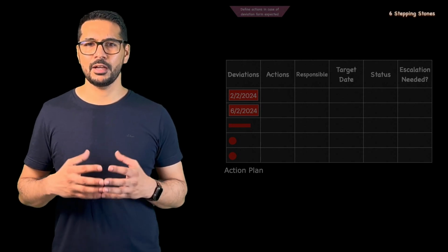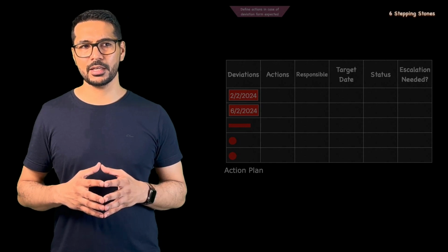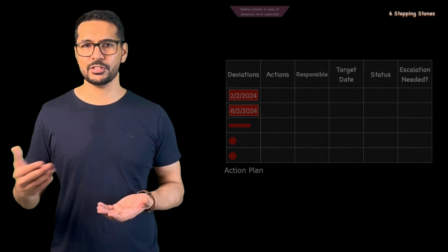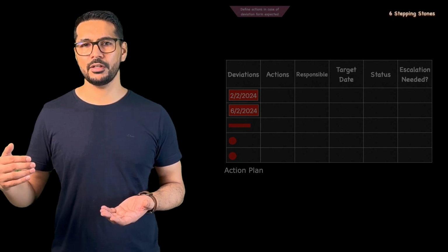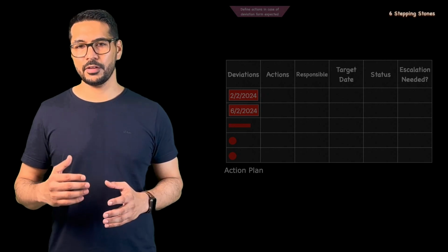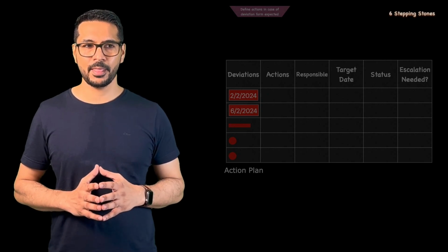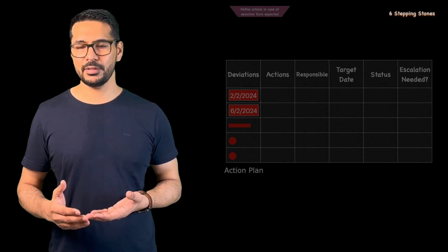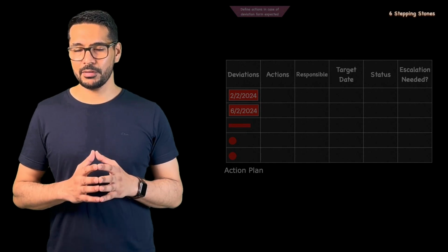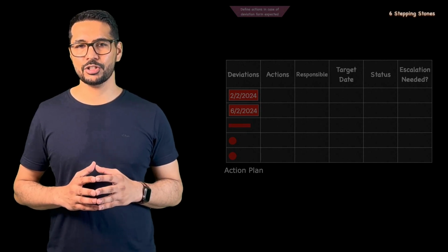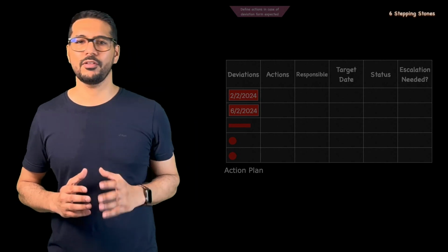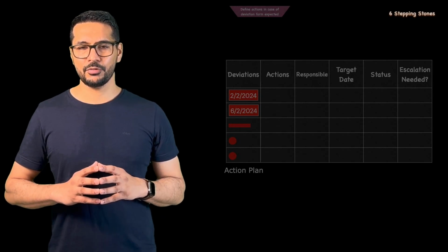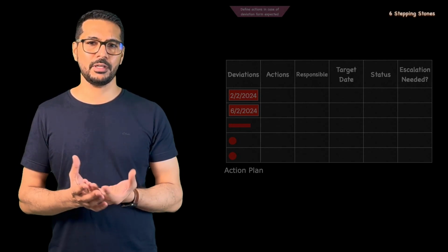Or we can design here the rules that in case this matter is not solved after 12 months, that has to be highlighted and should be communicated to the top management. Or if a problem could not be solved because the resources required to solve that problem are not available, and that couldn't be managed for 12 months or 6 months, then that should be highlighted to the next level of management. Such design rules could be mentioned in the beginning so that we have our complete visual management system.